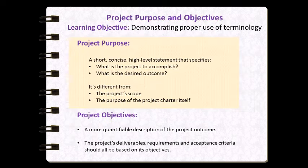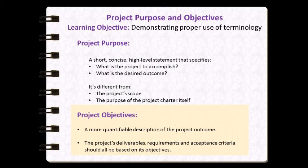The first two topics that you will encounter in the project charter are the project's purpose and scope sections. In these sections, the learning objective is to ensure that you demonstrate the proper use of project management terminology and that you can apply it appropriately to your project. The project purpose is a high-level, short, concise statement that describes the desired outcome for the project and what benefits will be derived from conducting the project. Keep in mind, you are describing the purpose for the project and not the purpose for the charter itself. The project objectives are based directly on the project purpose and should describe the project's outcome in a more quantifiable and measurable way, worded clearly enough that the project deliverables, requirements, and acceptance criteria can all be derived from them within the planning phase.